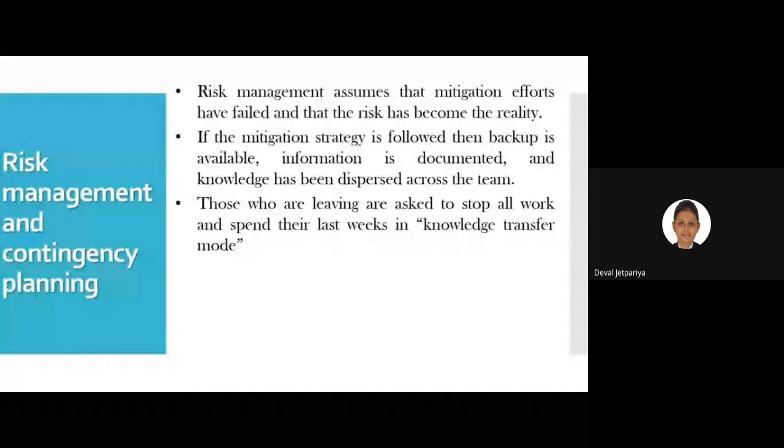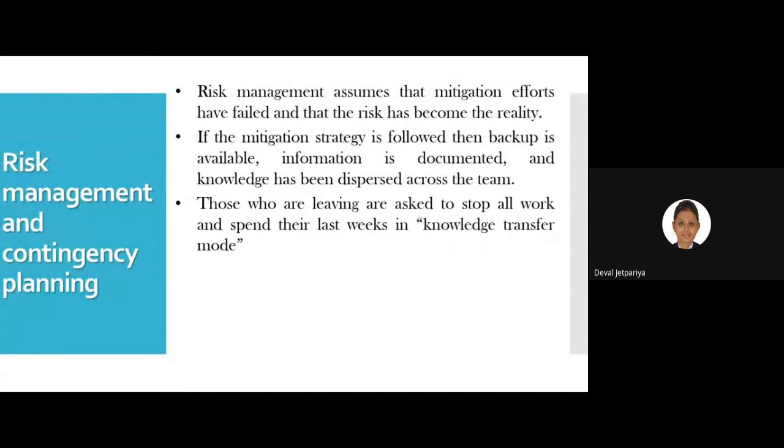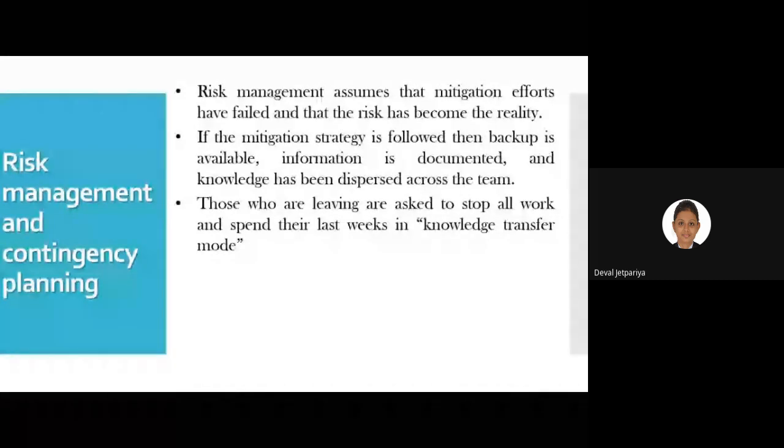So now we need to think about that risk and how we can find some solution from it. Those who are leaving are asked to stop all work and spend their last week in knowledge transfer mode. So we try to acquire some more knowledge and obtain some solution from that current risk.